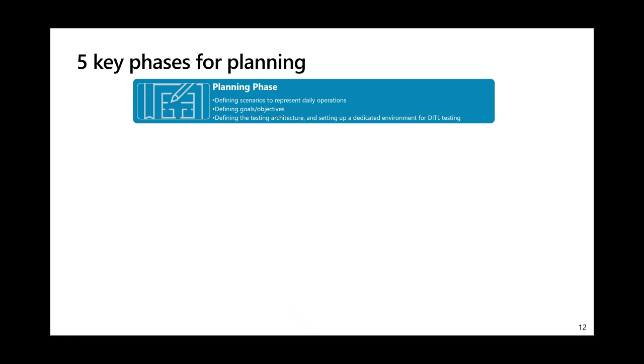In the planning phase, you should discuss and define the scenario in business daily operation. You should have the conversation with the key user, stakeholder, SME or partner sitting together at one table to come up with the agreed scenario that should be performed in the live testing. You need to follow all the key processes to simulate them in the live testing. We define as many scenarios as possible. That means the testing result should be more realistic.